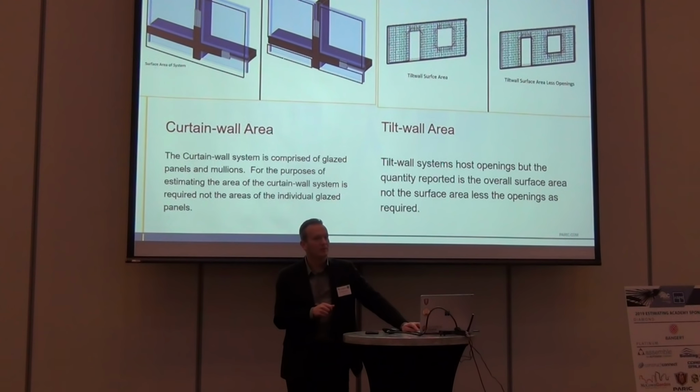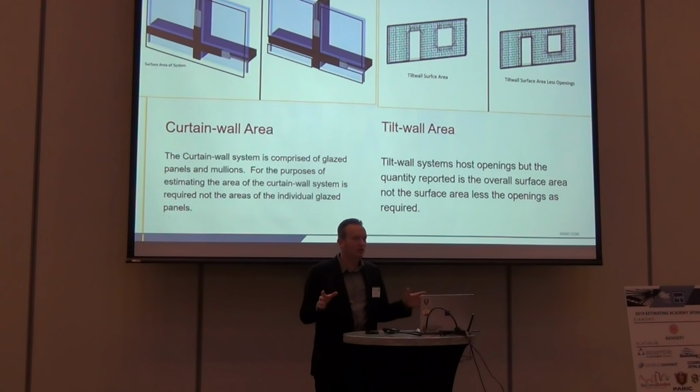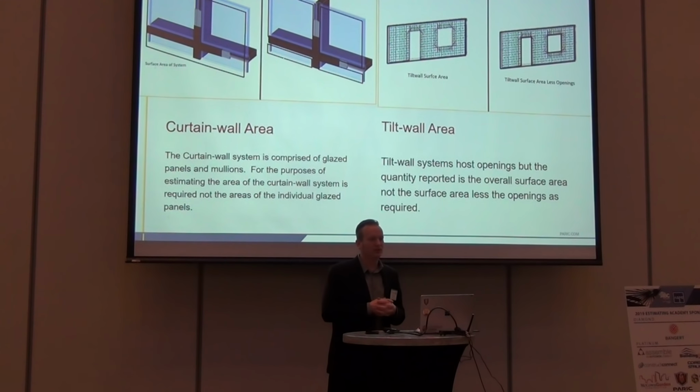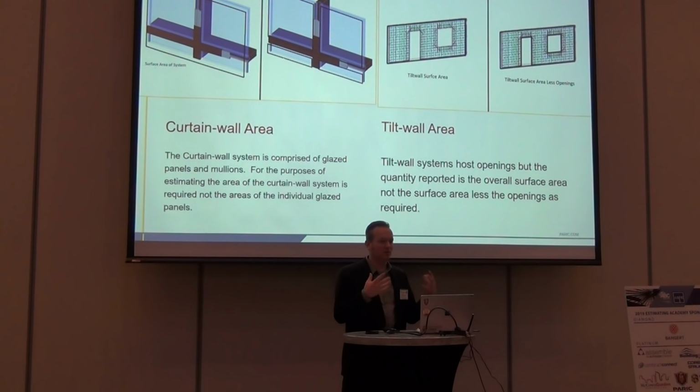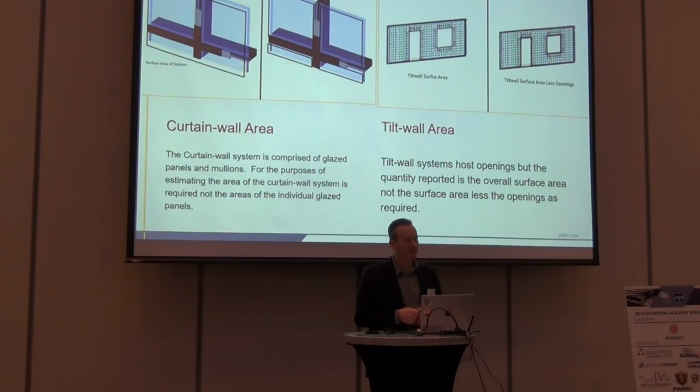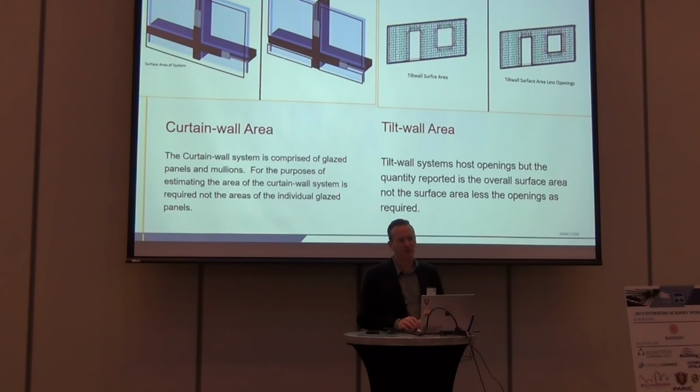Curtain wall especially. And there are some curtain wall manufacturers that quantify based on panels and aluminum, and they understand the weight and all those types of things. But in lay terms, we don't typically price like that. We typically price by square foot, right? So in that case, this becomes a particularly tough point for what we're doing.